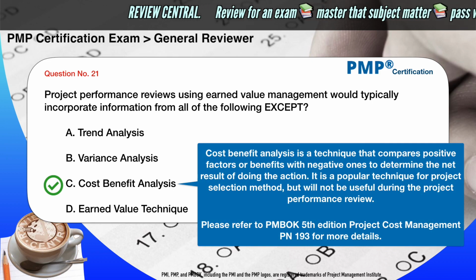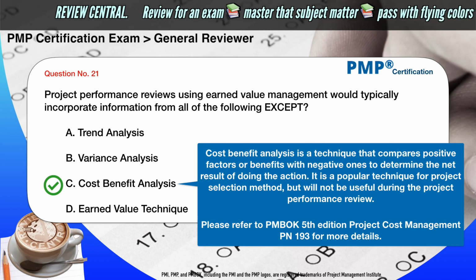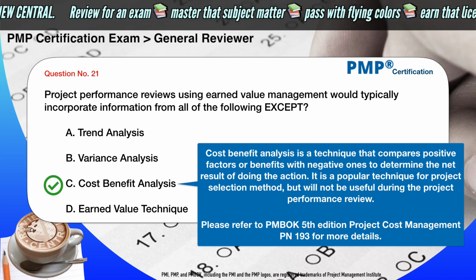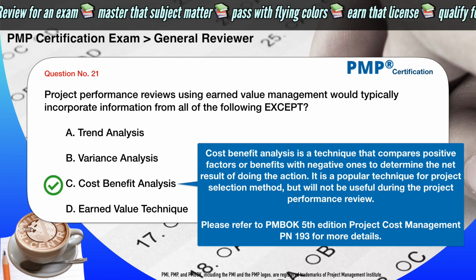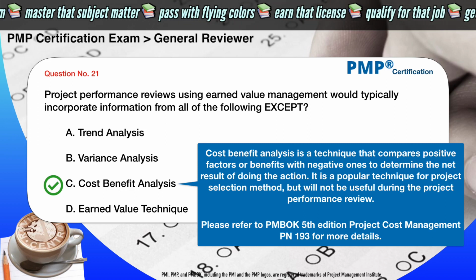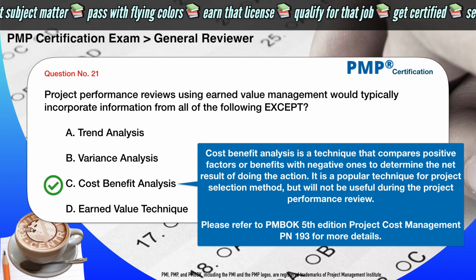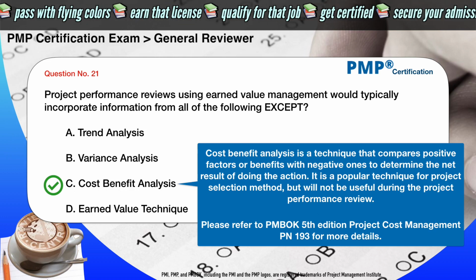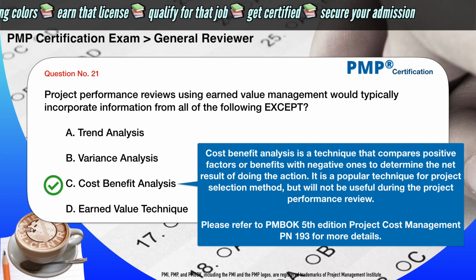Cost-benefit analysis. Cost-benefit analysis is a technique that compares positive factors or benefits with negative ones to determine the net result of doing the action. It is a popular technique for project selection method, but will not be useful during the project performance review.